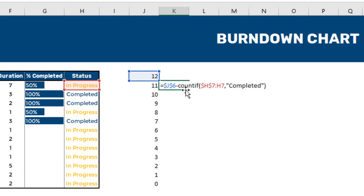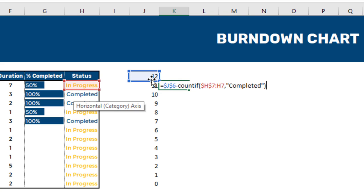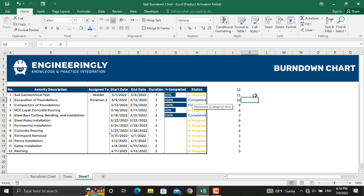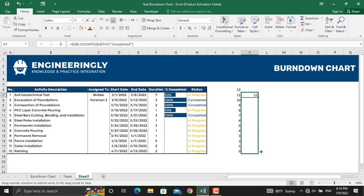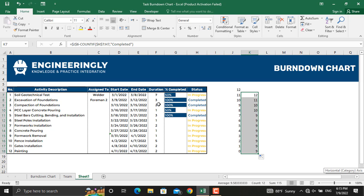This formula means that the number of completed activities up to each date will be deducted from the total number of activities. Press Enter and drag it down to the last cell. On this date the remaining activities should have been 11, but since this activity is not completed it's still 12. On the next day it should be 10 but is 11 since only one activity is completed.